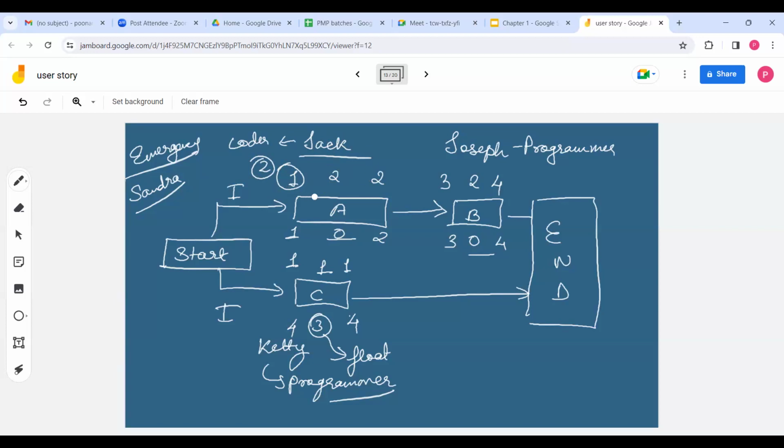So this means you have to delay here, the critical path. So if this starts on day 2, this will end on 2 and 3. This has to start on day 4. This will end on 4 and 5. Means the project is delayed by 1 day. So this kind of adjustment is known as resource labeling, where you have to adjust the end date of the schedule.